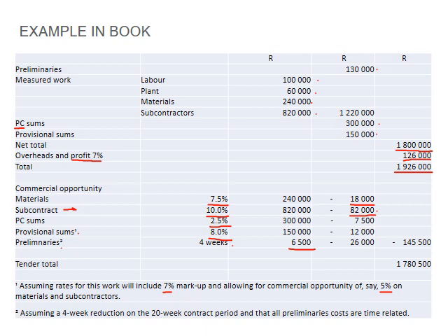So basically they said, okay, this is a project earmarked to be 20 weeks, but we're going to do it in 16 weeks. So we're going to get off-site earlier, and this is where contractors usually make the highest amount of profit, to get off-site as quickly as possible. So please remember that. This is where you can have the biggest competitive edge on other contractors.